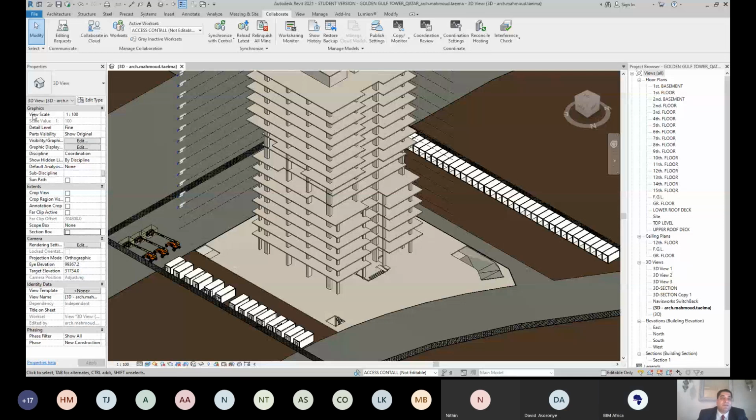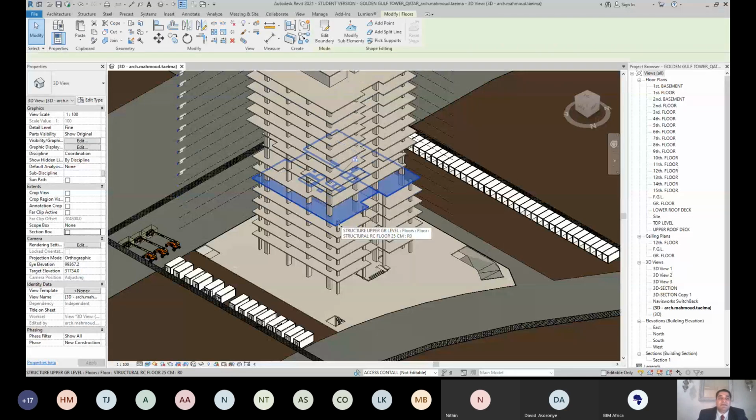It consists of, first, we make the work breakdown structure here, and then we make the same work breakdown structure in Navisworks here as a set. This is the same here, same names and the same items and activities. And it's the same in Revit, same names and activities.